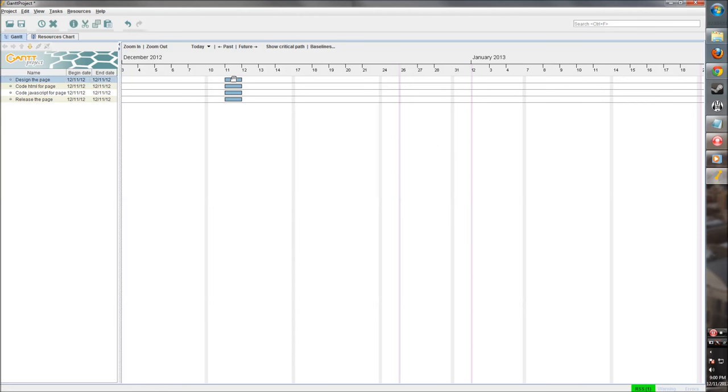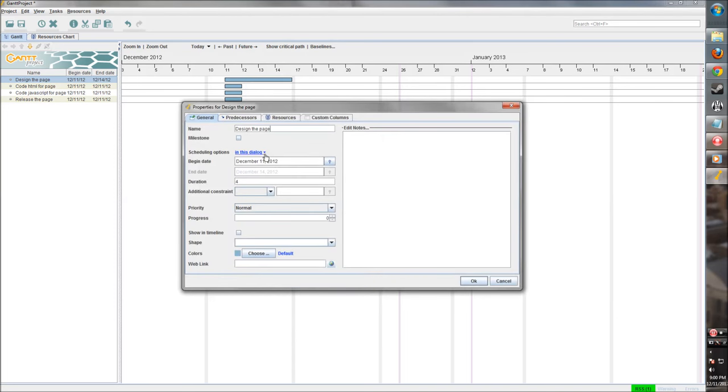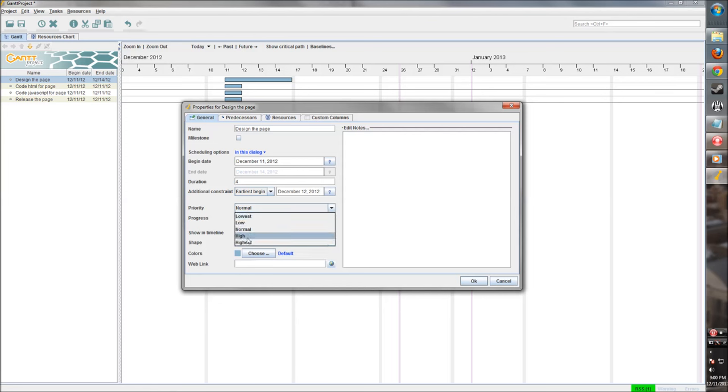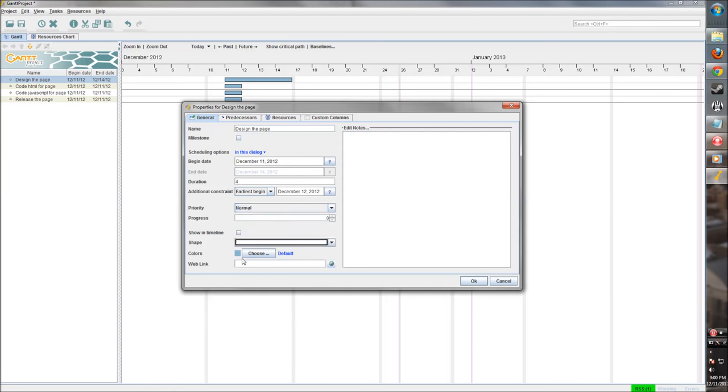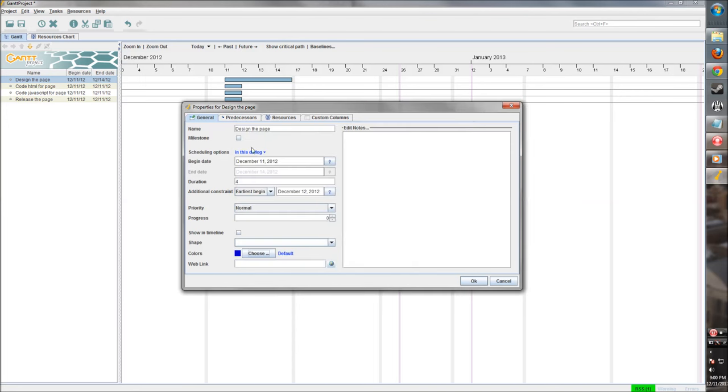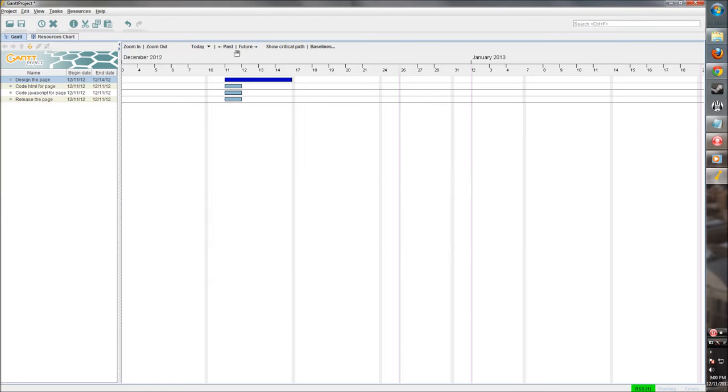So let's make this a little longer. So say designing the page, we have front end guys working on that. They're going to take a couple days. So let's make that about that long. We can go in here and change the properties a little bit. So let's make this begin as early as possible. So we want to begin tomorrow. And priority is pretty high. Well, let's keep everything normal for now. We want to show it in the timeline, keep the shapes similar. Let's make design stuff split. No predecessors. We don't have any resources yet. So let's get that.